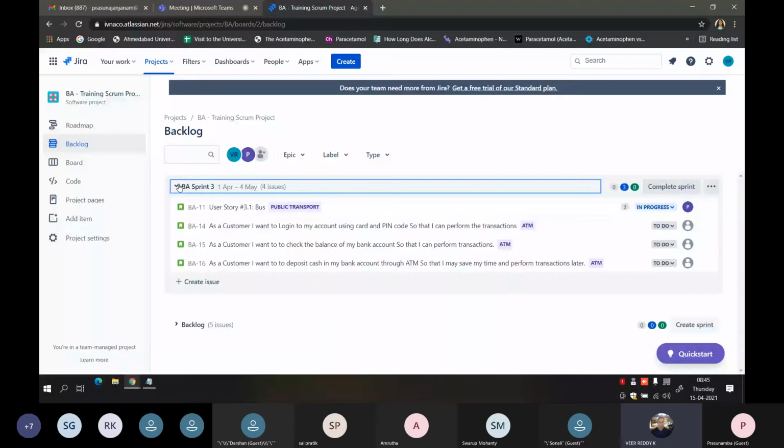I mean the product backlog, to be frank, because when you put it back into the product backlog, the priority of that user story may have changed. Two weeks ago when you took it, it was a high priority, so you took it into the sprint, but you could not complete it. Two weeks are over, and market conditions might have changed. If the priority changes and the user story is no longer that high a priority, the product owner will say, don't put it into the next sprint. Generally 99% it will go to the next sprint.